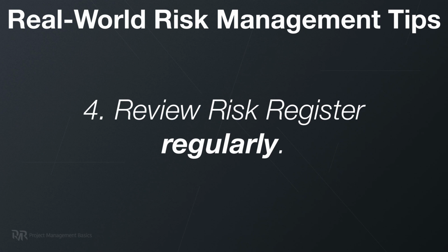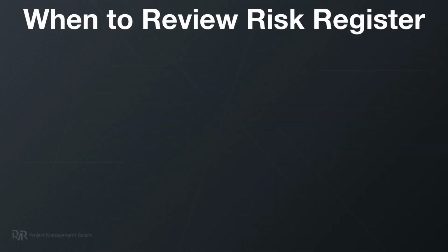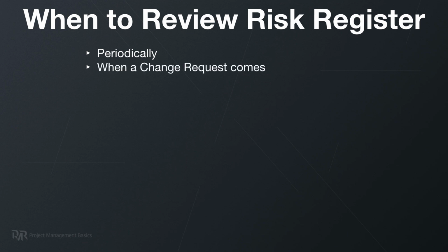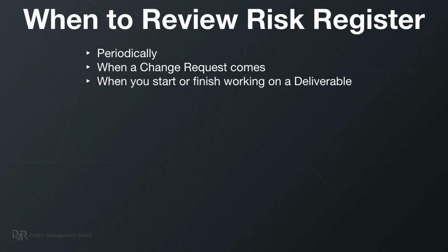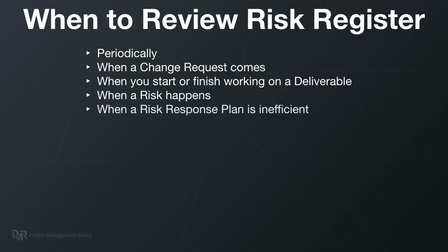Fourth, you need to review the risk register regularly. Create a recurring calendar event to review and revisit your risk register. So for sure review the risk register when a change request comes, when you start and finish working on a deliverable. Do check it when a risk happens, when a risk response plan is inefficient, or when you successfully managed a risk. You got the point. Do check the risk register regularly.